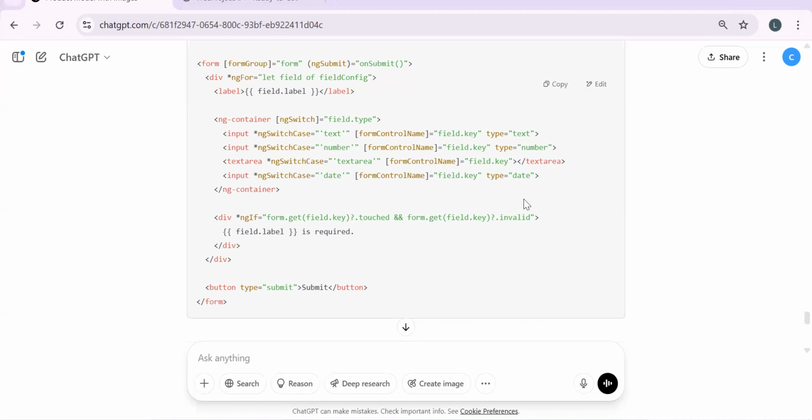When we work in a company, when we work in agile, after sprint planning, we get a particular amount of time just for the analysis. We also follow that. We actually create a task for just the analysis before starting the work. In that we put 1 or 2 days according to the story, and we do just the analysis for that particular task, like how we can move ahead. We don't directly start building things. We should do a proper analysis, and AI tools can come in handy. You can ask for the different approaches also. Then again you can think, according to these approaches, which approach you can select.